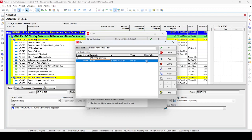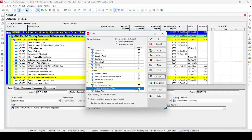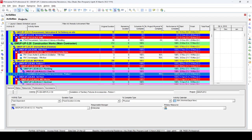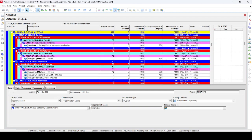The high value in the filter is the data date, meaning we go back from the data date by one week, two weeks, or one month depending on the report period. This is a simple filter — just keep in mind that your finish date is within the range of data date minus the previous period. Once you select this filter and press Apply, all the activities that were finished in the previous week or period will be shown. For example, this LPO was zero percent complete last week per the baseline and is now 100%. Similarly, door shutter and ironmongery installations were 50% and are now 100%.